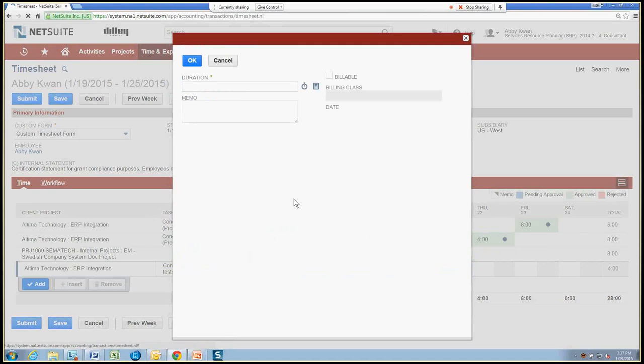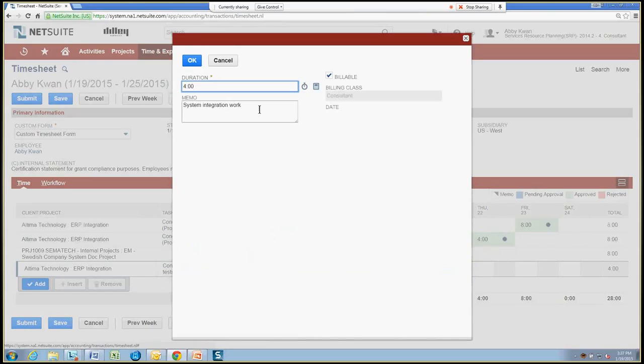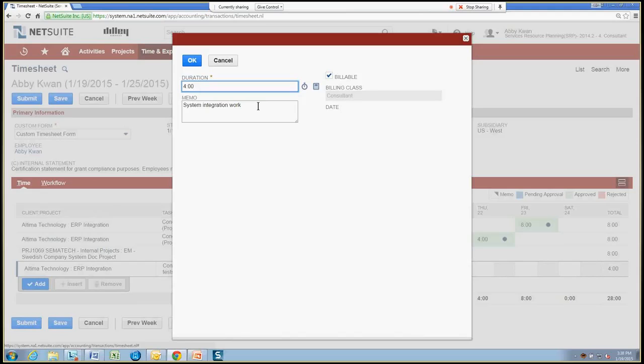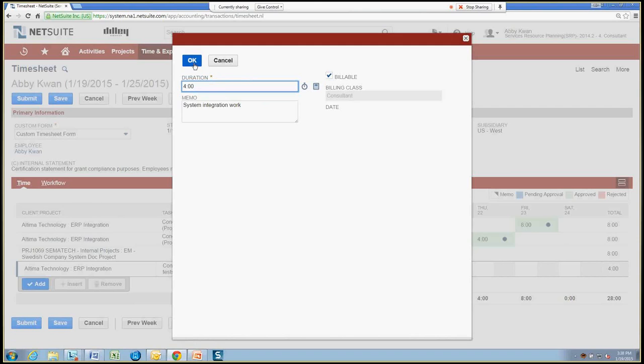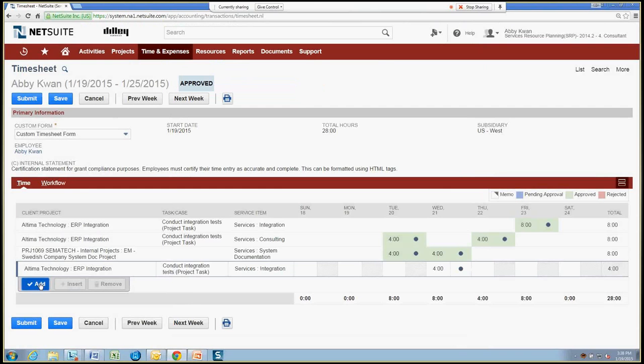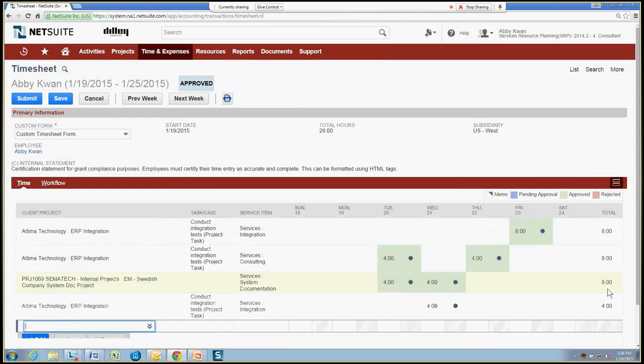Once we add that time in, we can go ahead and optionally put in some additional memo information that will be viewable by Abby's manager and time approver to help make the determination whether that time should be approved or rejected. The billable checkbox is defaulting to billable for this one since it is a charge-based billing project. So we will be charging for our time. If it was a fixed-bid project, that would probably default to unchecked, so non-billable.